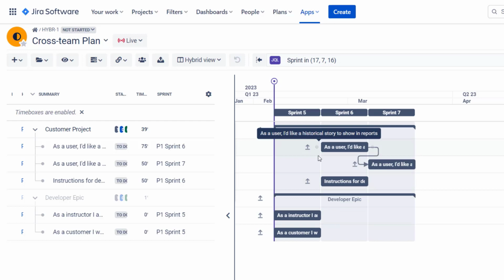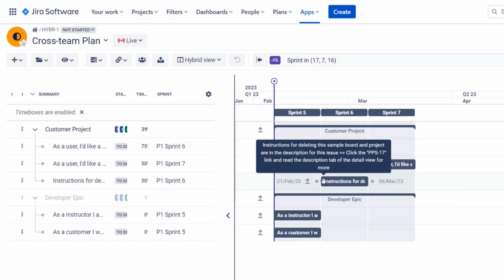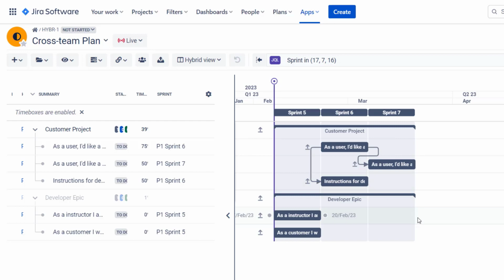So that this will tell us that these two tickets will always begin at the same moment in time. So BigPicture is a bit more robust in that area. Each type of dependency is represented as a different type of link on the issue level. So we will see exactly in what way this issue is dependent or related to another one.